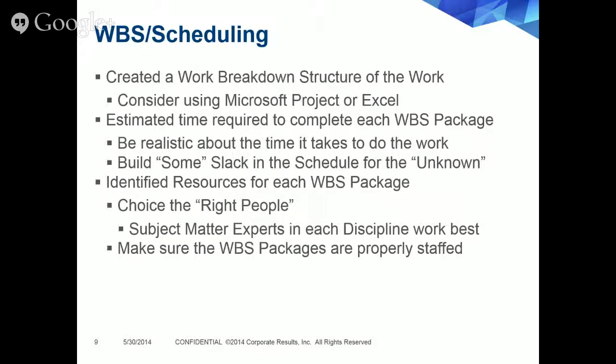So if you have something go wrong in the first 2 weeks of your WBS schedule, and you haven't built enough slack into the other aspects of it, your whole schedule will be shifting, and the resources will be out of line. So you really need to take each segment of the schedule and break it out in terms of what happens if something goes wrong here, or vice versa, just along the schedule.